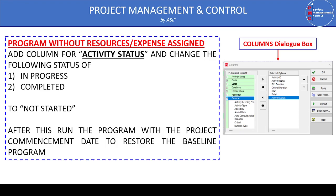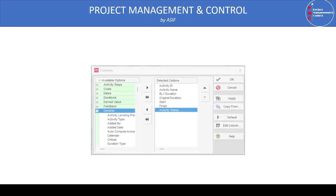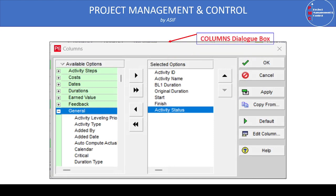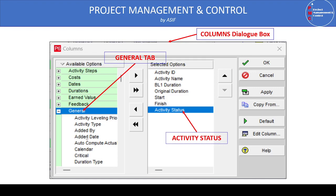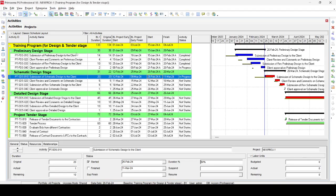To do this in detail: go to View, click on Columns, and the column dialog box will appear. Go to the General tab, and you will find an item called 'Activity Status'. Click on it and press the right arrow button to bring Activity Status to the right-hand side. You will then see it appear as one of the columns in the program of works.